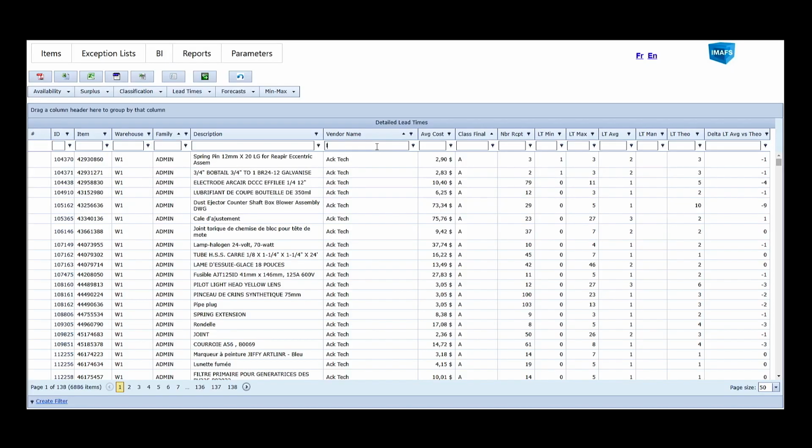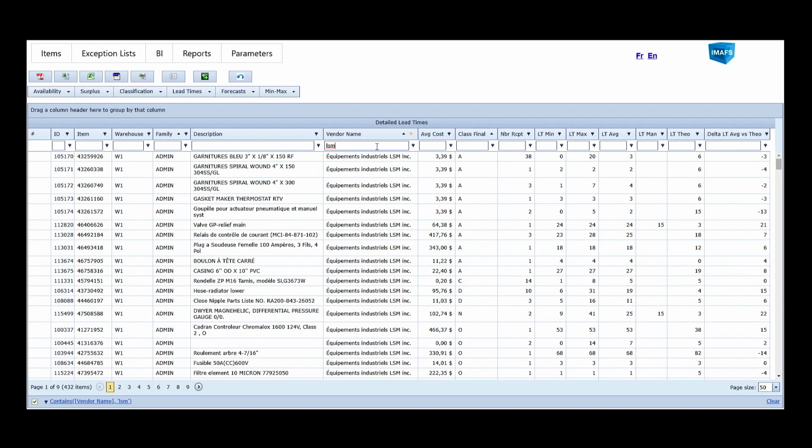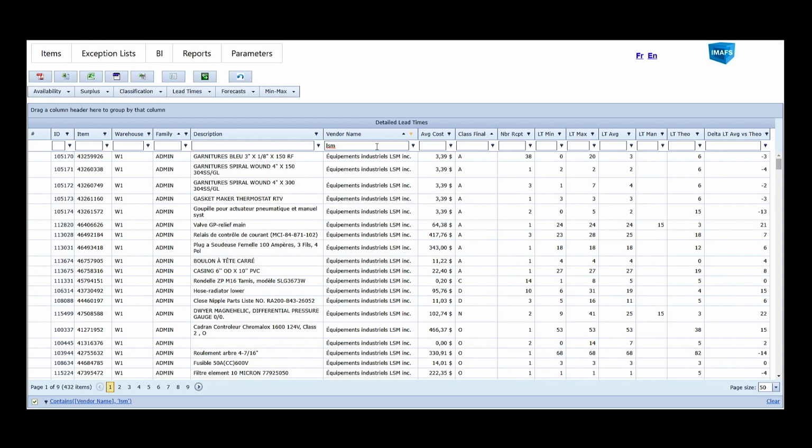Managing our lead times. First, we have to recognize that there are two types of lead time. There's the lead time that the vendor promised that he will deliver to, and there's the actual lead time that represents the reality of what and when he is actually shipping to us. We need to work with both. First of all, when we compare the promise of the vendor versus the actual lead time that we experience, we get an image of the performance of that vendor.